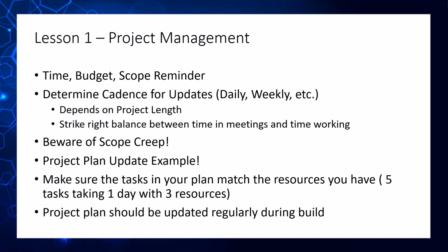You really shouldn't look for updates less frequently than weekly. So if somebody says, hey, we'll update you once a month, even if it's a 5-year project, that's not going to be acceptable. You should look for either daily updates or weekly updates. But just keep in mind that there's a difference between updates and status meetings, where maybe all the developers get on a call with you to talk through their individual pieces. Try to keep those types of meetings to a minimum,